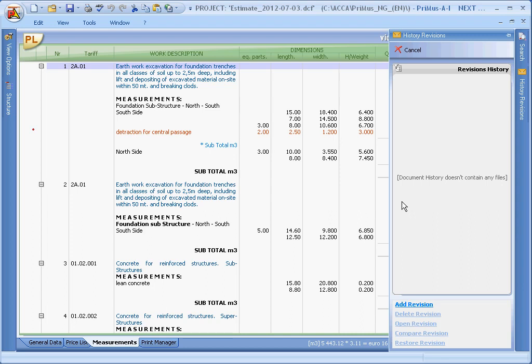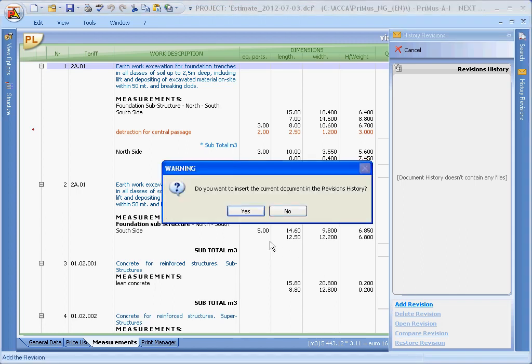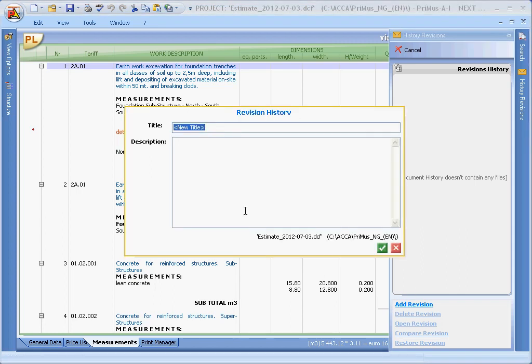Let's assume that after having completed the Bill of Quantities or Estimate document, we need to evaluate other design alternatives. Generally, this results in having a duplicate of the document to keep track of each case study. Now, this isn't necessary anymore because we can simply add a revision note to keep to one side, but keeping it internal to the same document.